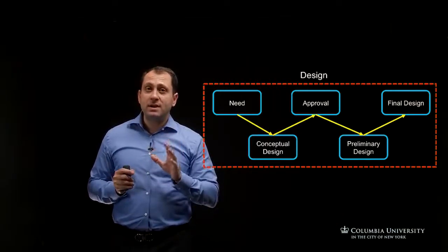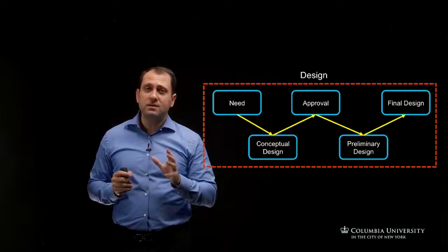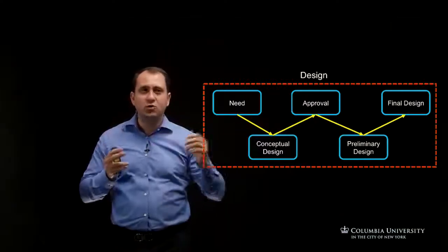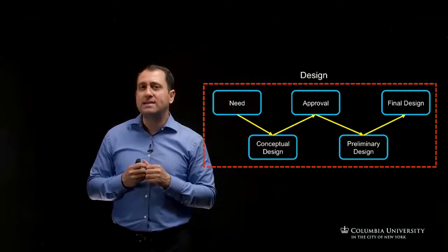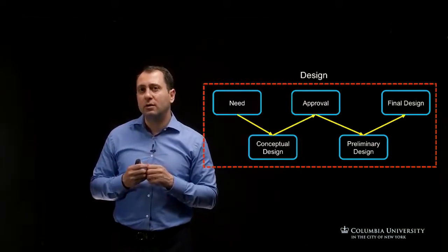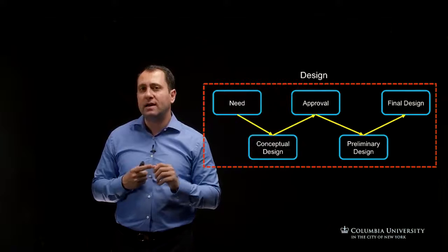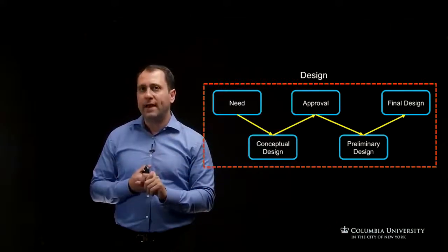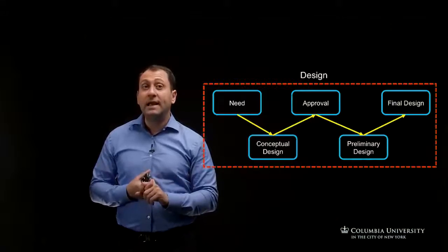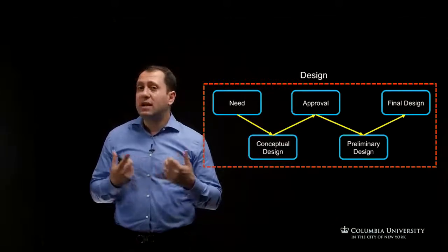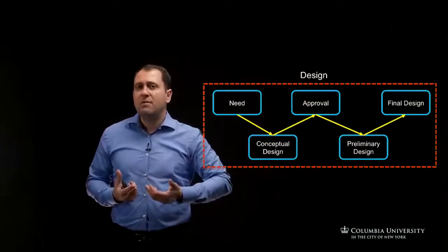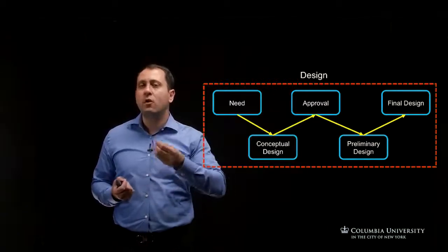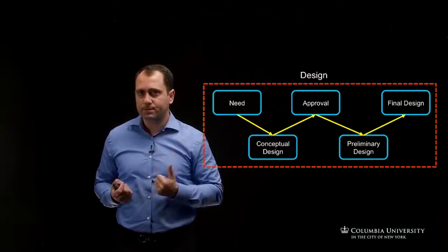At the preliminary design, for example, I'm going to give you more details than the conceptual design. We make decisions regarding the size and the location, for example, of the air conditioning, heating unit, electrical systems, or maybe also the primary water distribution components in the project.